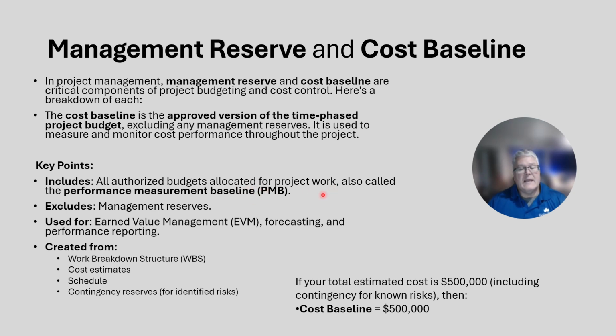Okay? It excludes management reserves. It's used for earned value management, forecasting, and performance. It's created from your work breakdown structure, your cost estimates, your schedule, and your contingencies. Here's an example. So, if your total cost estimate is $500,000, then our cost baseline is $500,000. Pretty simple.